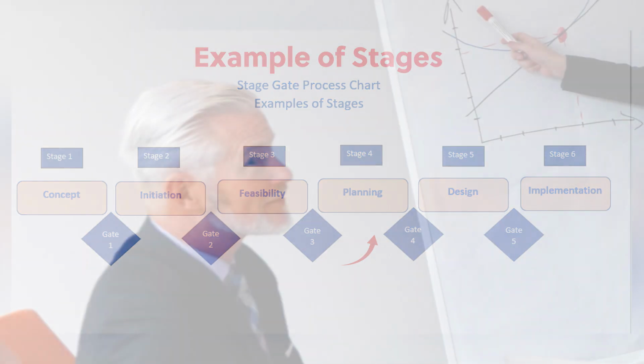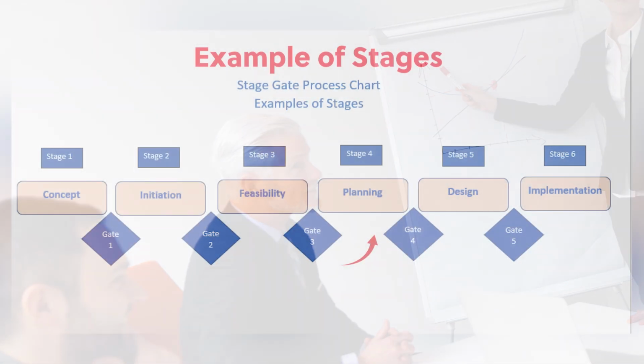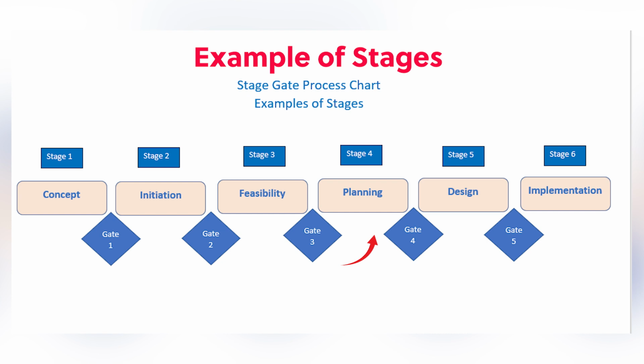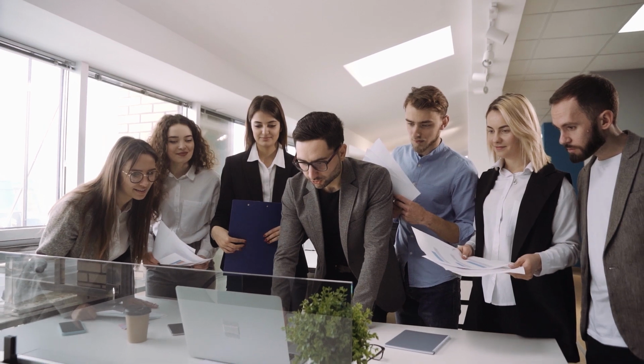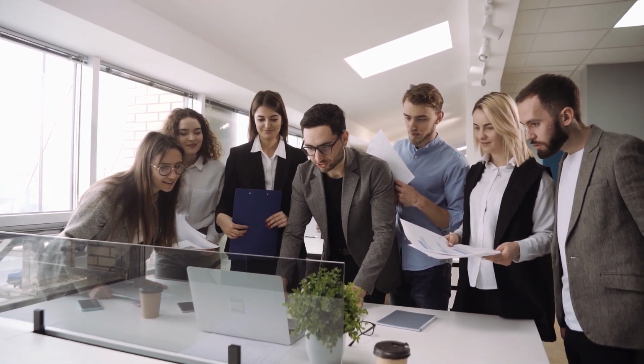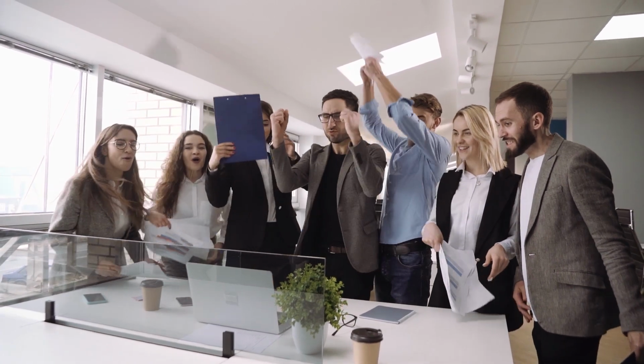So the senior management would check to see if they agreed with everything you got in, whether you'd considered all the things that needed to be considered at that particular time, to establish whether your project was mature enough to go to the next stage. So once again, hopefully the outputs will be approved work breakdown structure or scope document, schedule, project management plans, agreed risk register, and then the funds will be released for your design stage.